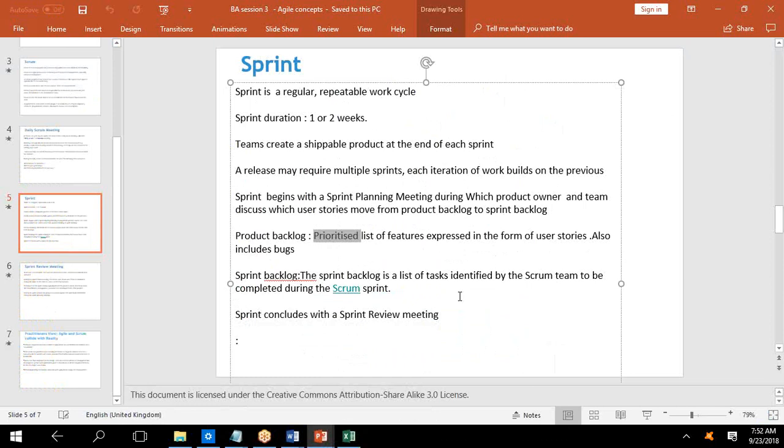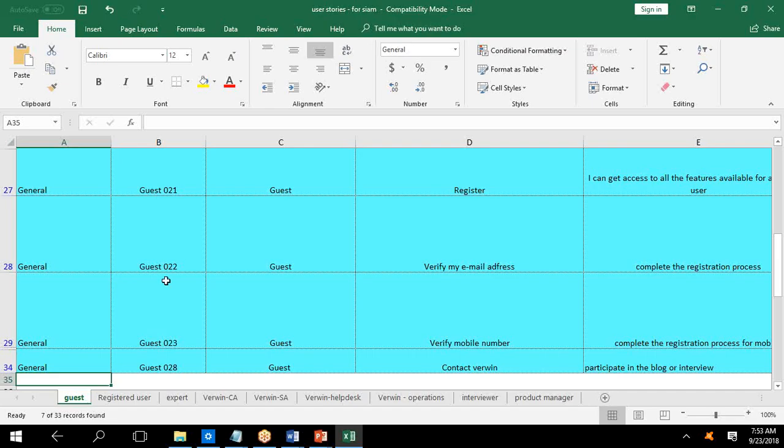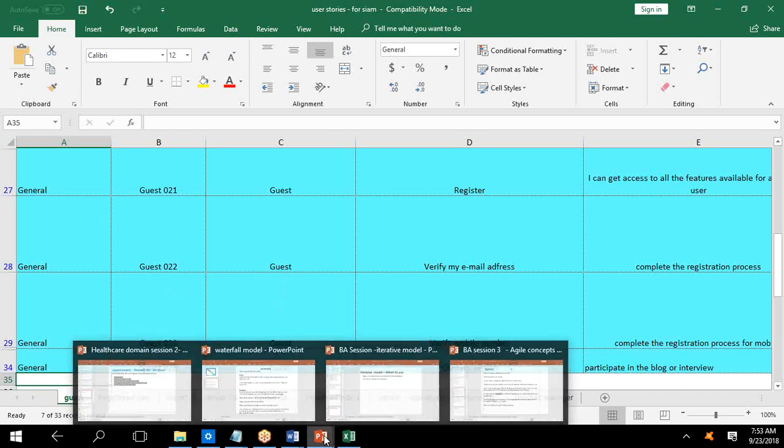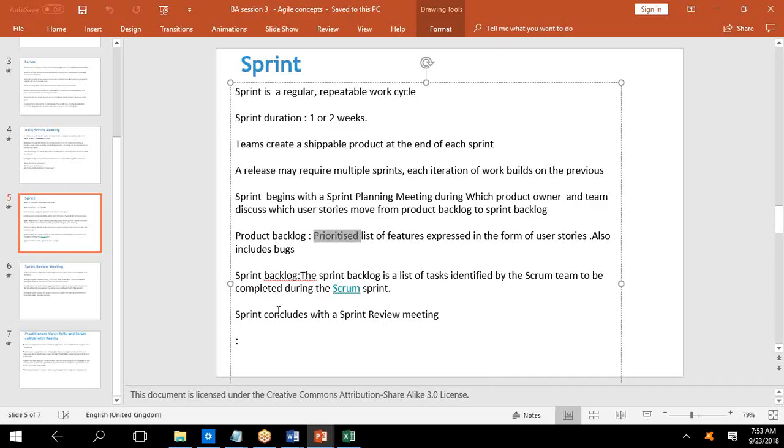Now for doing that, I'm actually working with an outsourced team. The outsourced team told me that they need 1 or 2 weeks, whatever. That's the time. So my time box is 2 weeks. In 2 weeks we cannot do 33. So they asked me what is the priority. My priority is the ones that I've highlighted in blue. So that is a real-time example for you.